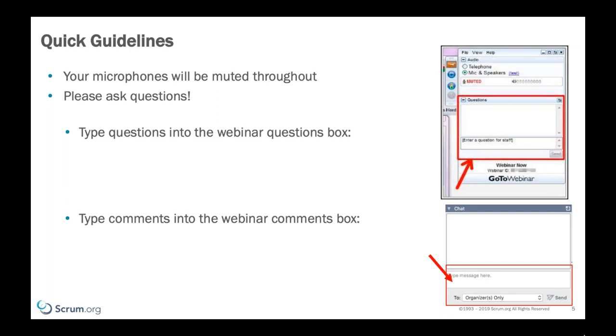So if I'm a Scrum Master and I have an impediment, I'm going to think two things. Can the team handle this? If yes, I'm not going to. That's the team's problem to go handle. My second question is, should the team be able to handle this? If they should, but maybe they don't have the skills or knowledge to deal with it, maybe that's what I need to work on. Maybe the real impediment that I need to deal with is that they don't have the skills or knowledge.